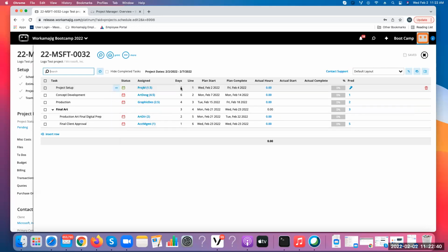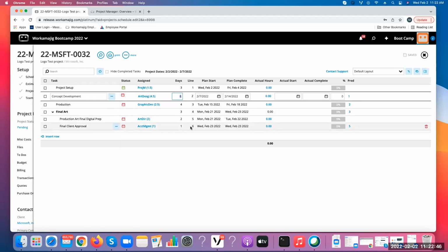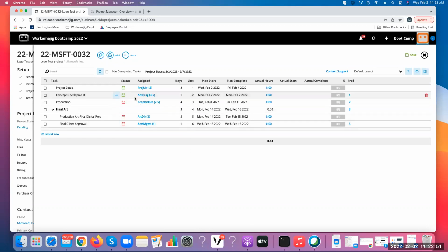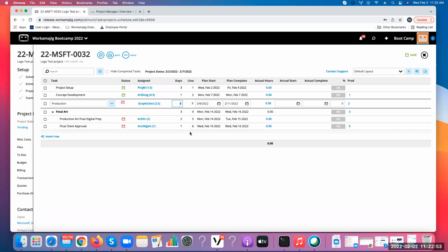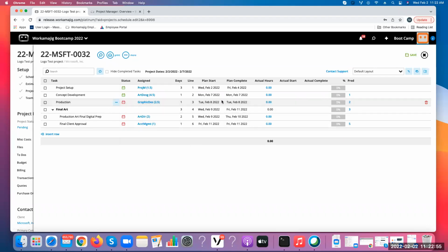We want to kind of spread out the reduction in the days if it's a rush project. So, some of this will seem unrealistic, of course, but I'm just trying to show you that the dates change to green whenever you shave days off, and it changes the dates. So rather than change the dates, you change the days. That happens automatically, that they're changed.